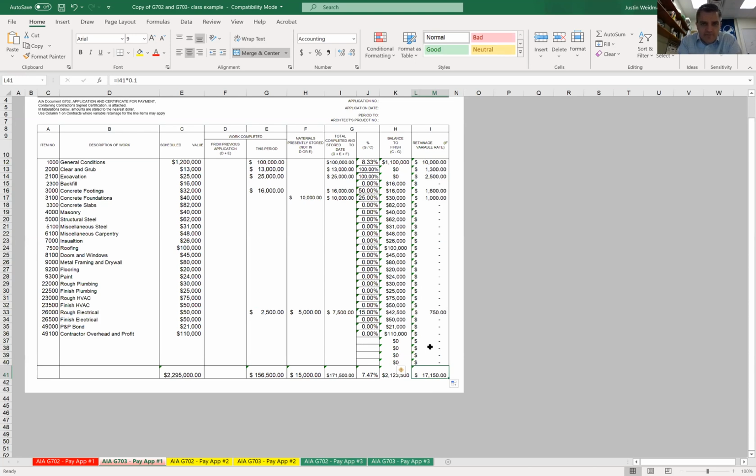So essentially it was a 5% retainage, because that money that they're holding is money that you're not able to operate with, that you're waiting until the very end of the project to get your money. And so if we finish the entire project and they're still holding 10%, we're not really getting our fee until the very, very end. We're not getting to use any of our fee till the end. And so we want to try and get that retainage as low as possible